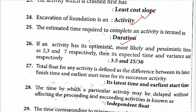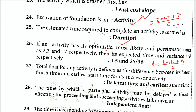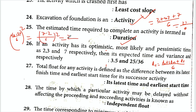The expected time formula is: Te = (To + 4Tm + Tp) / 6, where To is optimistic time, Tm is most likely time, and Tp is pessimistic time. For example: (2 + 4×3 + 7) / 6 = (2 + 12 + 7) / 6 = 21/6 = 3.5. The variance formula is: [(Tp − To) / 6]², so (7 − 2)²/36 = 25/36.